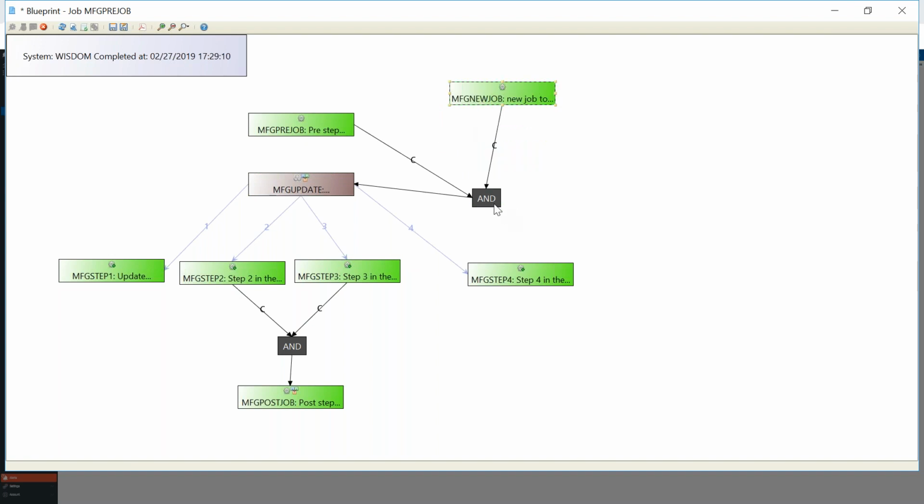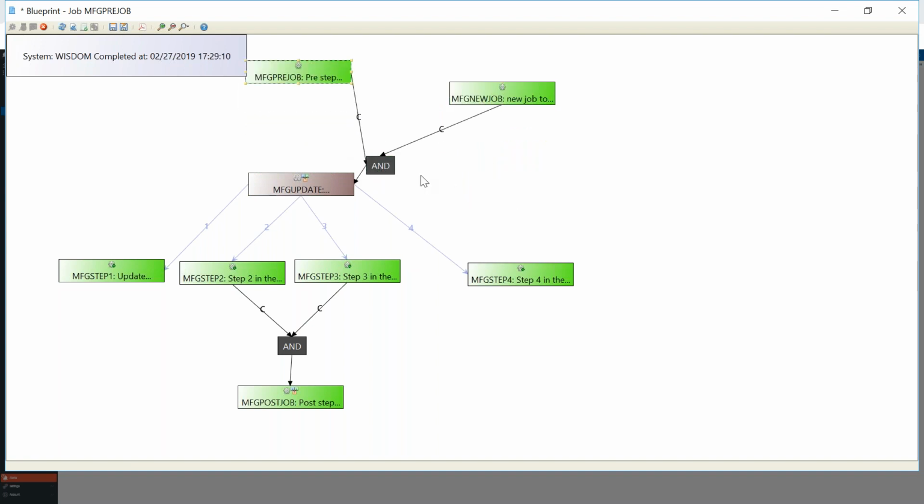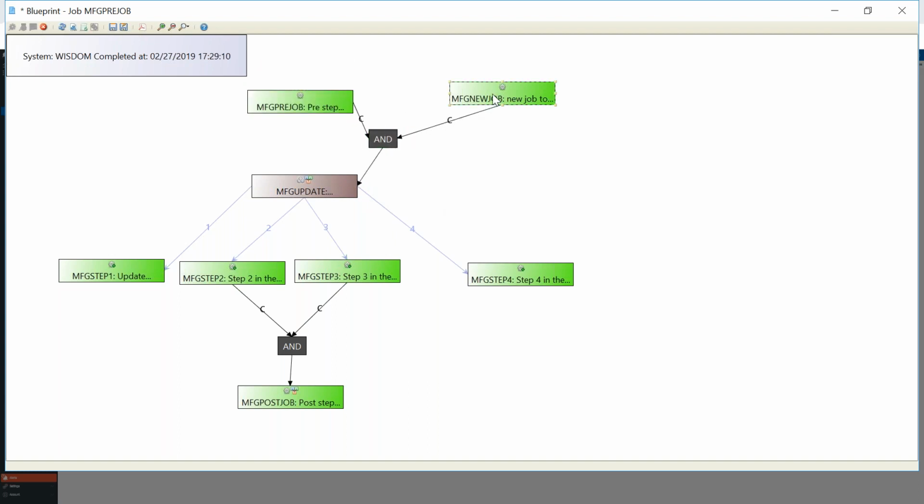So now we have this process here saying, hey, look, we're gonna run this group, but only after these two things run. Now, if I want to, I can move these arrows around and kind of clean this picture up a little bit. Maybe put that there. And actually, if I even really wanted to get better at it, I'd probably move this little box, or move this arrow over here. All right, so just clean things up a little bit so we can see our dependencies there. And now that's how we add a new job to a flowchart.